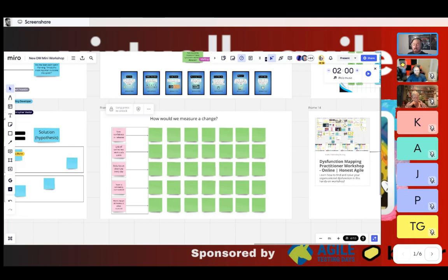Because again, there's no right or wrong answers here. But yeah, how many defects caused due to the release going out? Really easy, right? If on average we're creating 10 defects every time we do a release, and I do some coaching and I help the team understand the value of quality, and maybe we experiment with creating a new definition of done, do I then see a decrease in the number of defects after a release? Yes or no? Great way of checking to see if that activity is taking us in a positive direction. Yeah, how many releases need to be rolled back? That's a good one for that.